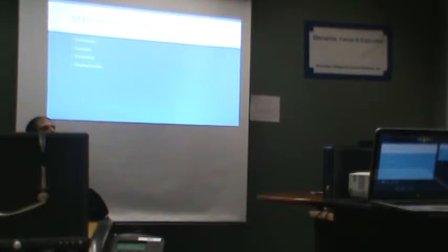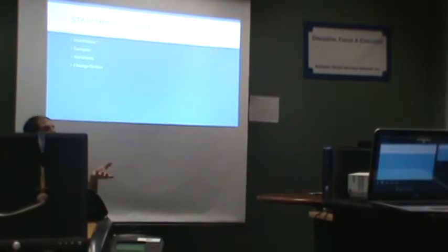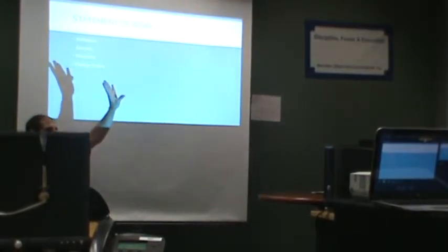So then it's the verbal communication. I'm going to send you an email saying I'm sending you a change order, saying you already verbally approved it. Please reply back to me inside a few minutes. Let me know that you agree. We can process the signature on the document separately.